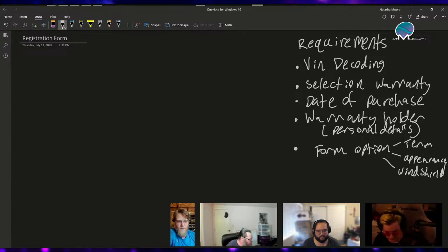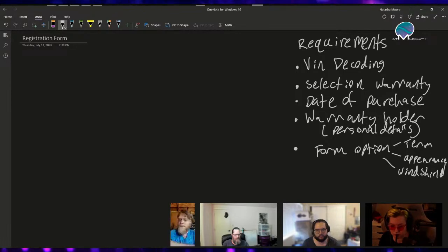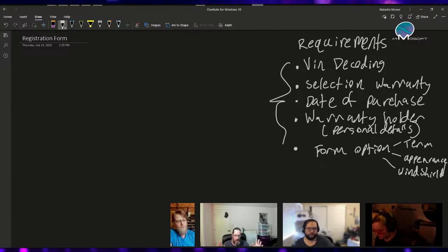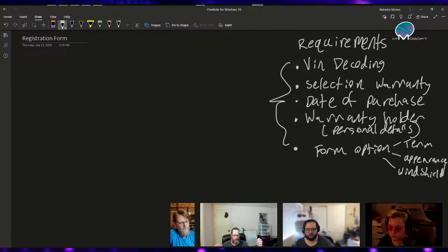So I think right now we can move into the decomposition, Tasha. I know before we were talking about possibly doing a mock-up, but I just realized that's not necessary because we just need to do the decomposition phase. When we're doing task decomposition, obviously all the tasks are based off of the requirements, right? And then we're going to take each one of the requirements and break them down into individual tasks that are actually units of work that we can do to complete a given task.